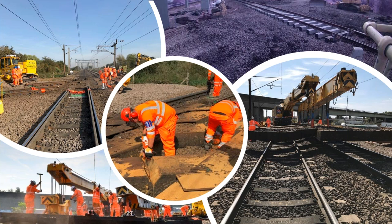The ballast was glued in the previous layout introduction in 2003, so that had to be sorted out, getting access to the actual beams, then cutting them up so they could take them up in sections, and then clearly getting over the suction of the intervening 15 years of traffic going over the top of the layout and compacting all the ballast together, to actually make it more difficult for lifting the old bearers out of the layout. But clearly this is Greenheart timber, remember, and it's a very, very hard timber, so cutting those slots in the centre wasn't necessarily the easiest thing to do, because this timber's very, very dense and difficult to work with.